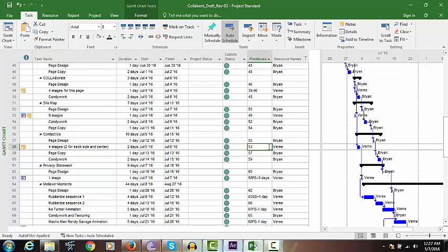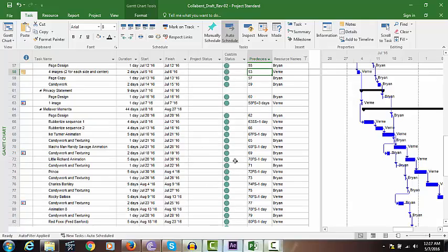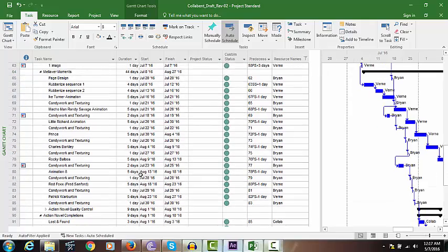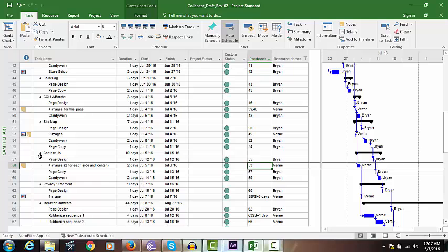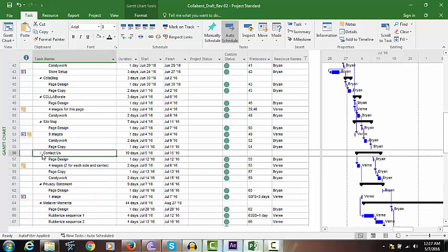So that's the main reason that you will not be able to see any sort of a correlation between what the summary task is giving as a duration and what the durations are coming here, because 1 plus 2 plus 1 plus 2 is not the total duration that you get here. The 1 plus 2 plus 1 plus 2 and the gaps between the Werner's activity that ends and the Brian's activity which starts. So this duration gap itself is what is being shown in the main contractors as a summary.